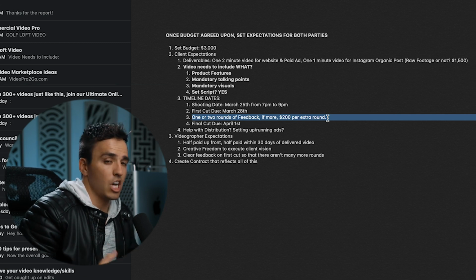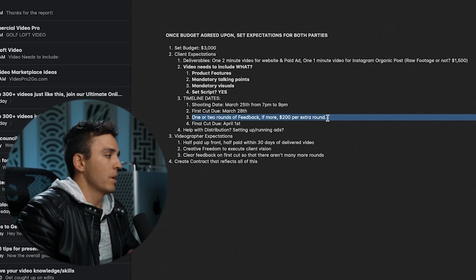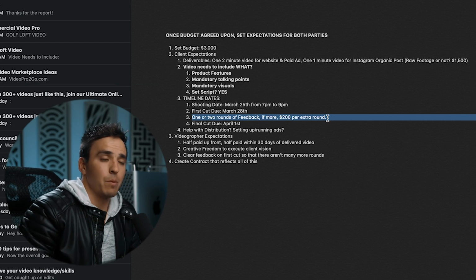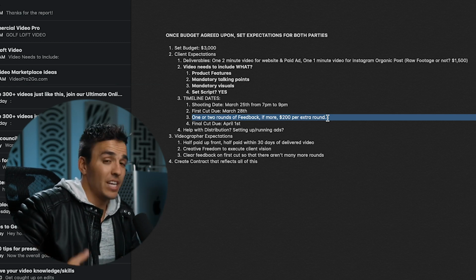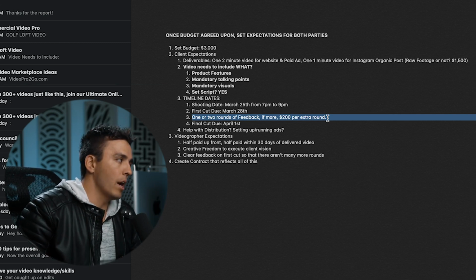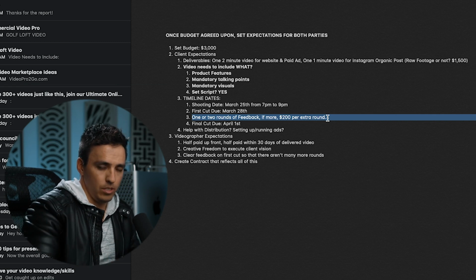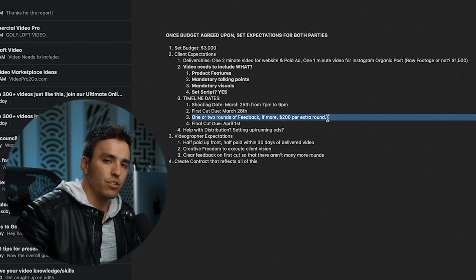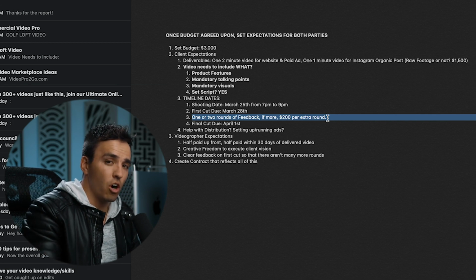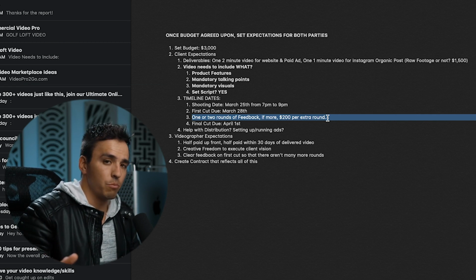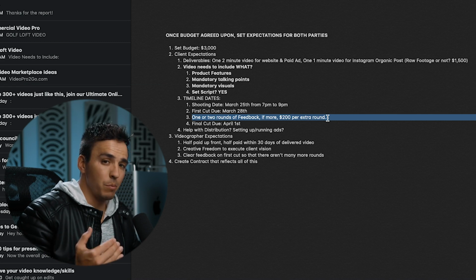So assuming you've done your job as a videographer to meet those expectations, if they're still wanting more feedback because they're changing their mind on the go, which has happened to me, that's when you say, all right, I feel like I've delivered what you said you wanted, and you're now changing your mind and requiring more work of me. And so I'm going to have to start charging you for new things that you're bringing up now that you didn't bring up in the beginning stages.